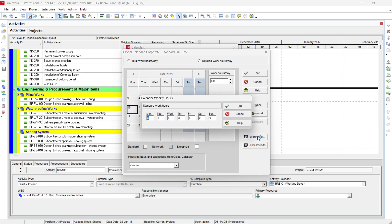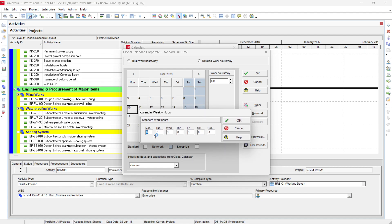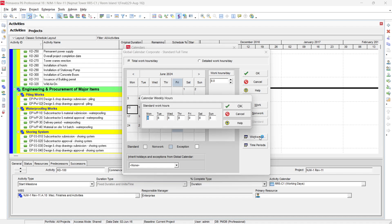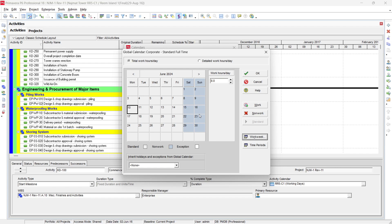Go to the Work Week option and it shows Monday, Tuesday, Wednesday, Thursday, and Friday at eight hours — five days, eight hours per day. In Gulf countries, Friday was previously a holiday and some companies still use Friday as a holiday. If Friday is your holiday, set Friday to zero and Saturday and Sunday to eight hours, then click OK. To revert, go back to Work Week and set Monday through Friday to eight hours and Saturday and Sunday as holidays. This will show Saturday and Sunday as holidays in the Gantt chart.